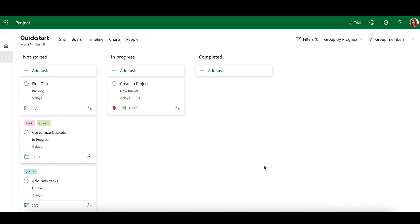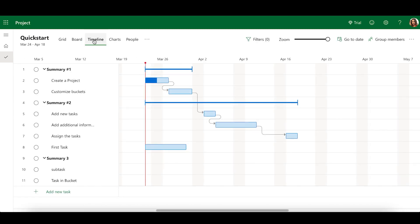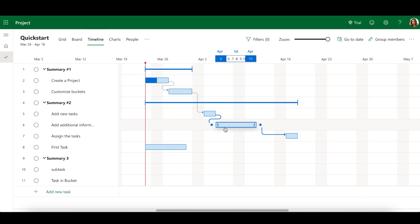Timeline View allows you to easily manage project scheduling. To access Timeline View, select Timeline in the View Selector. Timeline View displays your tasks based on their start and finish dates. Dependencies between tasks are represented by arrows.